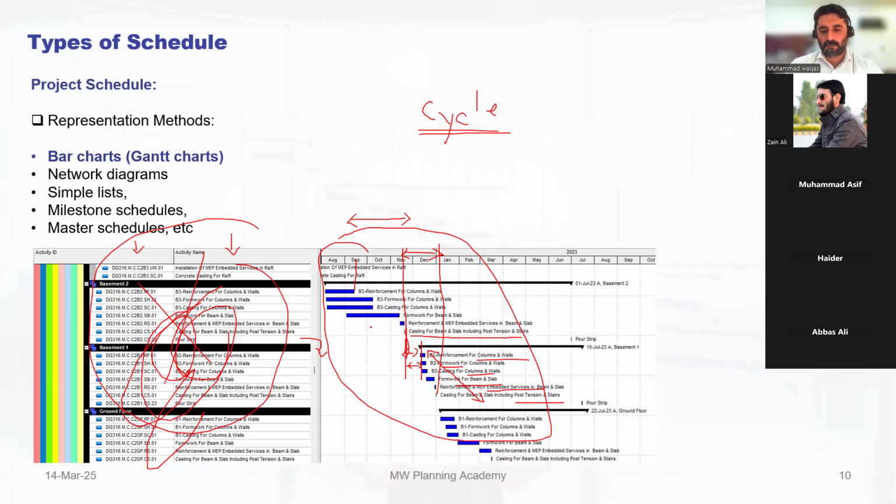No, there is no standard. It's not that I say 45 just for the sake of saying. You have to go to your project and see it. Of course, it depends on the area of that slab, how many columns are coming, how much manpower you have put in. But as a typical cycle, for example, you cast a slab today, even if it's 5 columns or 50 columns, you will take some time to do those columns.